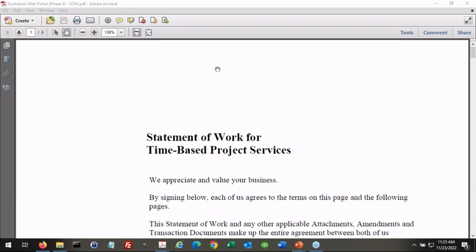What I said was, I think this project is going to take approximately X number of dollars based on my expert opinion. That's not contractually binding. We're not committing to that number because it depends on what you want to do, but we're giving you a number for planning purposes that we think is in the right range. It's a reasonable amount. It gives you some planning numbers you can use to see if this is even worth doing from a budgetary perspective. Now, we can't give you a specific bid because we don't know enough details yet. You weren't able to provide any details about the existing software application.